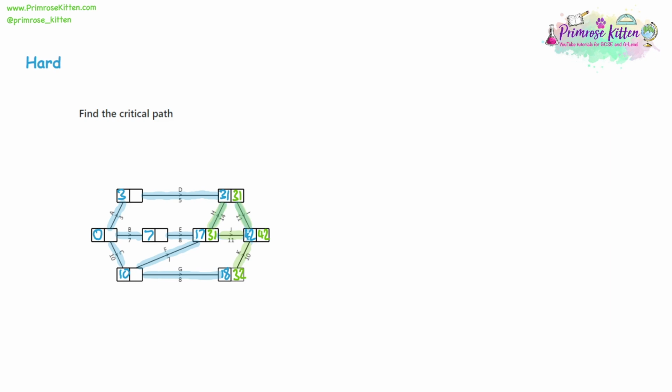Now, when working forwards, we want the largest number in the box, when we're working backwards, we want the smallest possible number. We want 17 in there. If we get to that node at 31 hours, then yeah, we can start task J on time, that's fine. But then task H and I won't be done by 42 hours. So we reduce it to 17, because tasks E and F absolutely have to be done by 17 hours for H and I to be done on time.